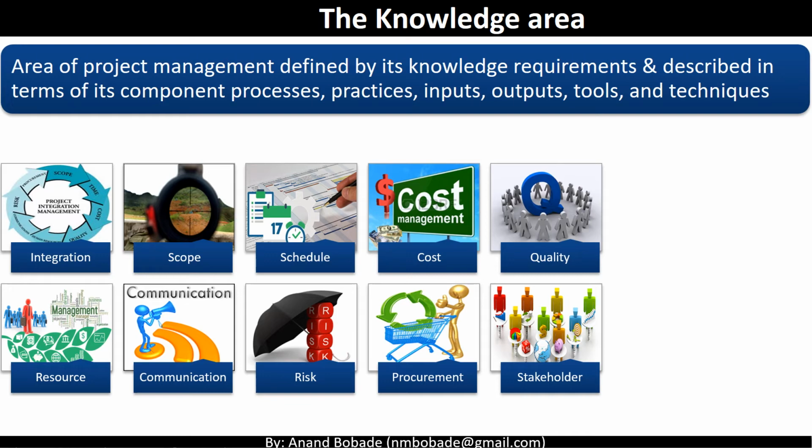Project risk management. Uncertainties or risks are the potential of losing the value of a project deliverable. Thus, processes are grouped which help in identifying risk, prioritizing risk based on impact and probability of occurrence, identifying risk response if a risk occurs, implementing risk response, monitoring them through the project, and so on.